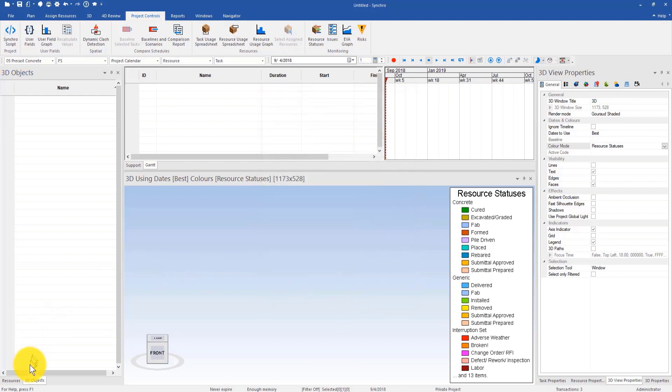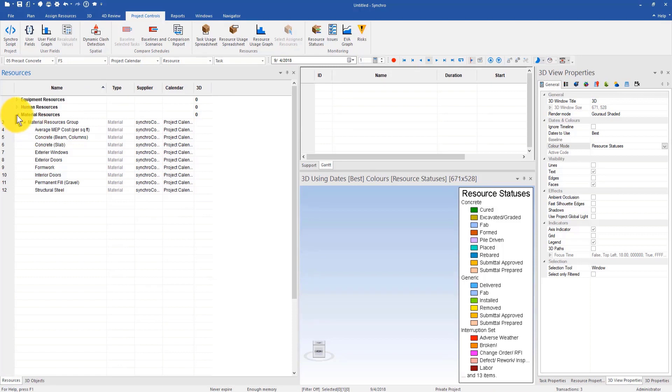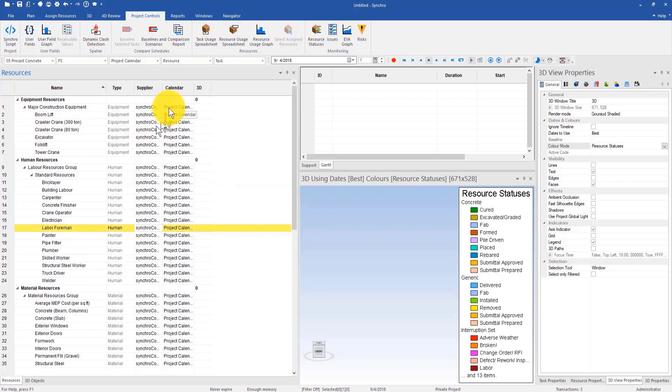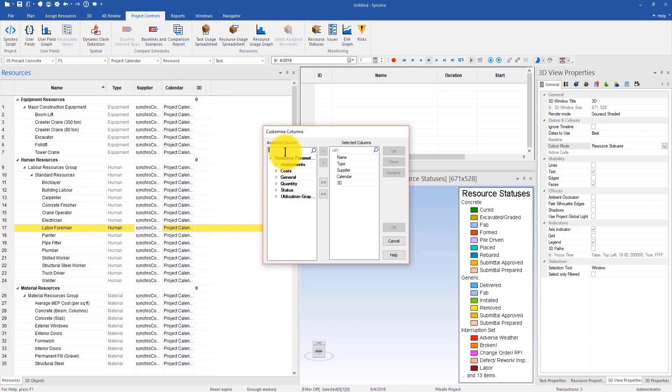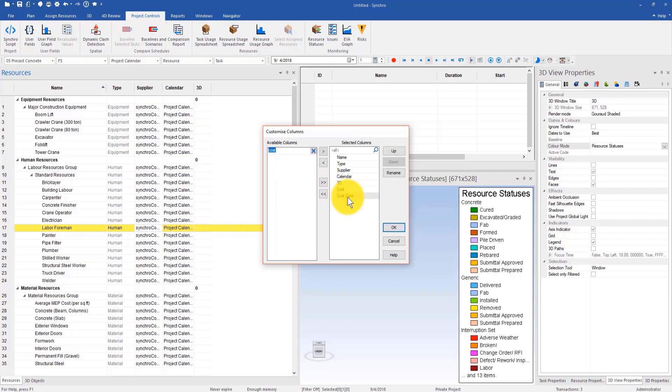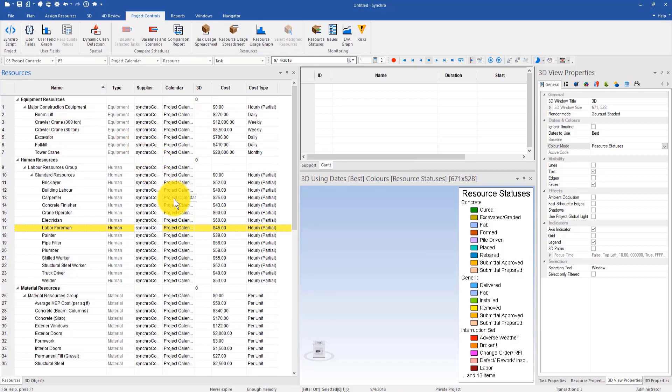Right now you can see this is my imported resources. They include some material resources such as concrete, exterior windows, exterior doors, formwork, etc. It includes certain labor resources, human resources, as well as equipment resources. However, how do I display their costs, their unit price? What I can do is right-click in the resources window, customize columns, and then if I type in cost in the search box, I can drag cost and cost type into the selected columns box and hit OK.